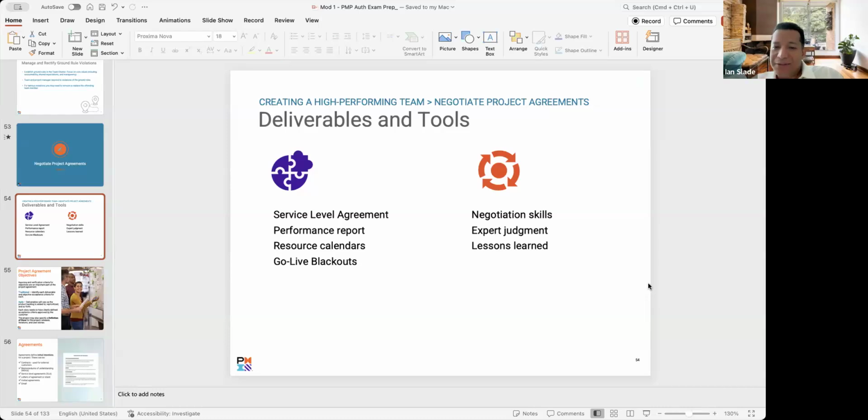What you want to be able to do is to do both all throughout. You want to bring up the good things, and you also want to bring up the things that didn't work, so that in the next milestone, the next phase, the next gate, whatever next is, you're able to learn from it and apply it right away. The tendency we have is to kind of smooth over the negative, and then towards the end, that's when we bring it up. So, Nick, how did you really feel? And at that point, it's kind of too late for this project. It'll help someone else in their project, the same or similar, but not so much for this project.